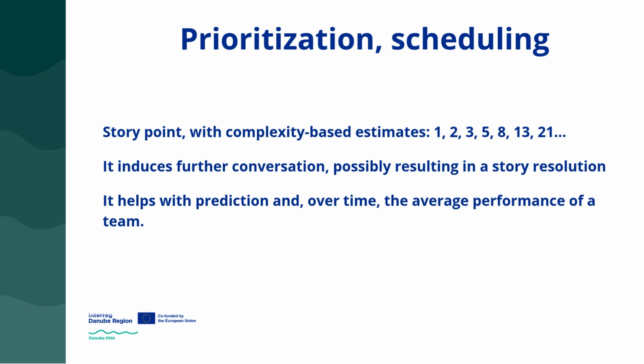This estimation follows a special scale, using what is known as the Fibonacci sequence, where each number is the sum of the two preceding numbers. This helps categorize tasks in a way that accounts for the increasing uncertainty and difficulty as tasks grow larger. This effectively illustrates how each task is incrementally more complex than the previous one, which in turn is more complex than the one before it.